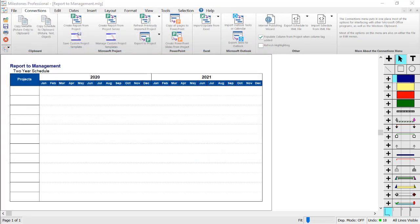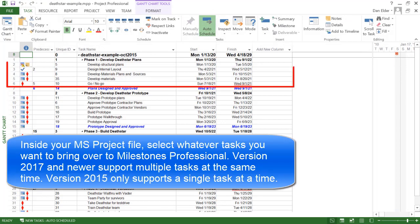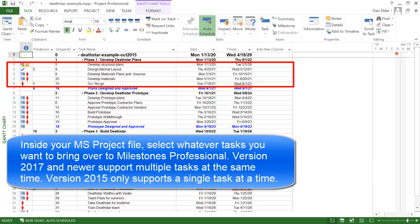Now we need to add some tasks from Microsoft Project to our schedule. I will now go to the first project file, in my case the Death Star file. Inside that file, I will select whatever tasks that I'd like to import to the milestone schedule. If you have Milestones Professional 2017 or newer, you can select multiple tasks at once. If you only have version 2015, you can only import one task at a time with this method, so keep that in mind.